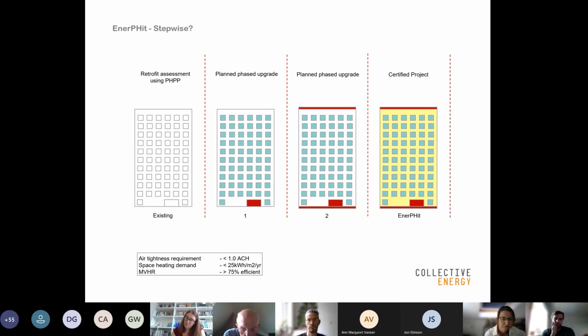A lot of the work that we were doing to these buildings was primarily external, with the occupants staying in place throughout the construction works. But it makes sense when you're investing in the scaffolding or the mast climbers for 22 stories to tackle all of these things at the same time. So most of these external works have been carried out all in the one contract.